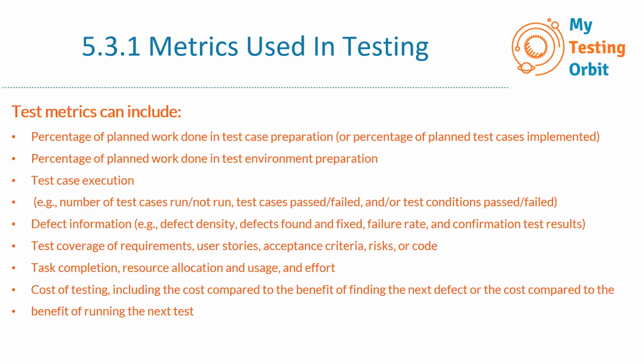earlier identified 10 resources, but while collecting the metrics we see that 10 people are not able to execute the tests or perform testing activities because the project is more complex than we anticipated in the beginning, and maybe we now require 15 resources. So this means that next time, maybe next phase or next similar project, we will have that metric in mind and we can learn from it: for this kind of project, 10 resources are not sufficient, and maybe we should allocate 15 resources next time. So this is also an important metric.